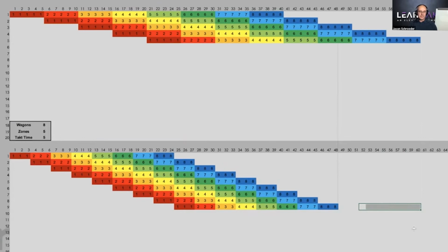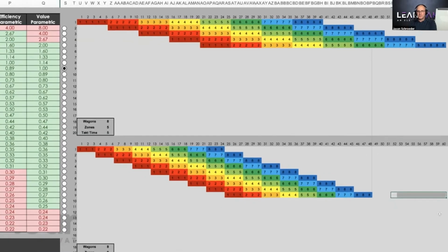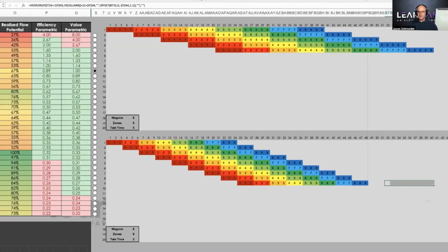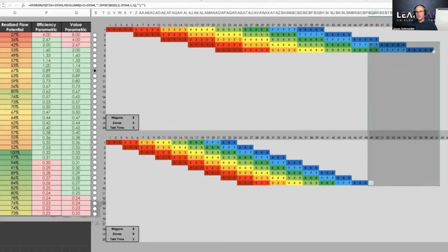The trade partner and the overall contractor will still make more money. If those workers just sat there and did nothing, you would still make more money in a takted system versus traditional scheduling, because we've gained buffers and we've optimized the sequence and we're going faster and we're going the same speed, the same distance apart. So yes, my answer is I have no problem with them working on workable backlog, stopping and doing nothing, or doing what Scott said, pull the wagon out, or actually pulling that room or that area out of the zone. I have no problem with that.